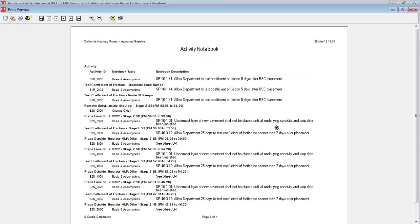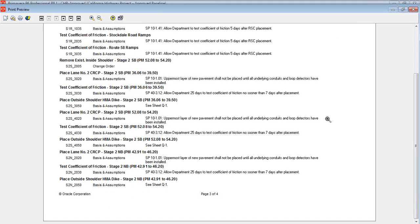The font size is going to be a problem, and there is a point where if you're just simply typing very long paragraphs for your comments, it's going to work against you. Try to be brief. And if you can't be brief, split it up into more than one topic. One last thing I can do here under Page Setup is try something like fit it to one page across — that should help a little bit. And it's getting better. With a little bit of tweaking, this will be a perfect report. The key here is don't stop until it fits exactly the way you want.